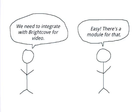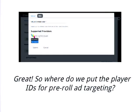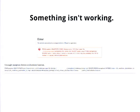A classic example: the client says, 'We need to integrate video with Brightcove — we just need to get Brightcove video on our Drupal site.' We say, 'No problem, there's a module for that, this will be an hour.' Then you deliver, and they say, 'This is fine, but we need to put our player IDs in to target our pre-roll ads.' And you say, 'The module doesn't actually do that. We can do it, but it's going to take 10 hours instead of one.' The client told us what they thought we needed to know. They assumed that when they said 'Brightcove,' it would include all the stuff they have in Brightcove, whereas that's not really how it works.